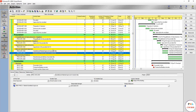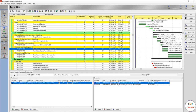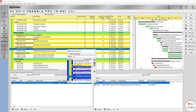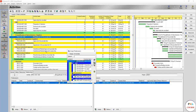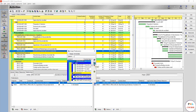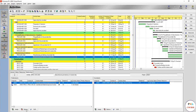Now we relate the ceramic tile activities to shop drawings. A quick way: press Assign from the predecessor/successor field and it will navigate directly to the assigned activity. Here we link the ceramic tile material submittal to the shop drawings approval by consultant — finish-to-start. We also remove the appointment of subcontractors relationship since that has nothing to do with the ceramic tile supplier. We then link the ceramic tile manufacturing and delivery to the porcelain tile installation activity.